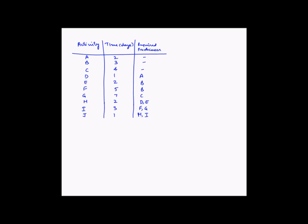Let's draw a network diagram and understand how to identify the critical path. In this example, we have been given activities A through J. For each activity we have the completion time in days and the predecessor activities. Activities A, B, and C need two, three, and four days respectively, and are not dependent on any other activities. Activity D has a duration of one day and is dependent on activity A.